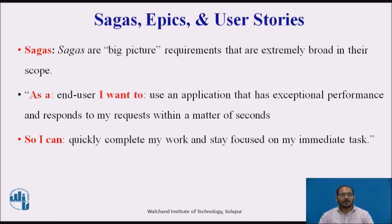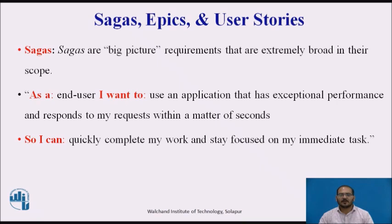Sagas are big-picture requirements that are extremely broad in their scope. An example of a saga might be: as an end user, I want to use an application that has exceptional performance and responds to my requests within a matter of seconds, so I can quickly complete my work and stay focused on my immediate task. This type of requirement is very broad in scope and sets an expectation for all functions in the application.